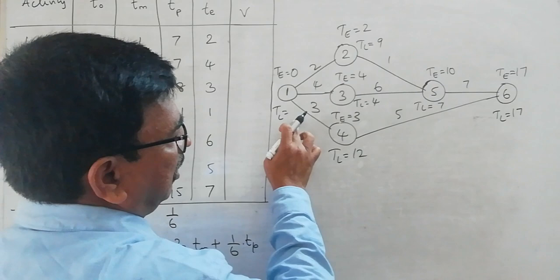Now we identify the critical path by checking nodes where TE = TL. These are nodes 1, 3, 5, and 6. Confirming: TE = TL = 0 at node 1, 4 at node 3, 10 at node 5, and 17 at node 6. So the critical path is 1→3→5→6 and the expected project duration is 17 weeks.